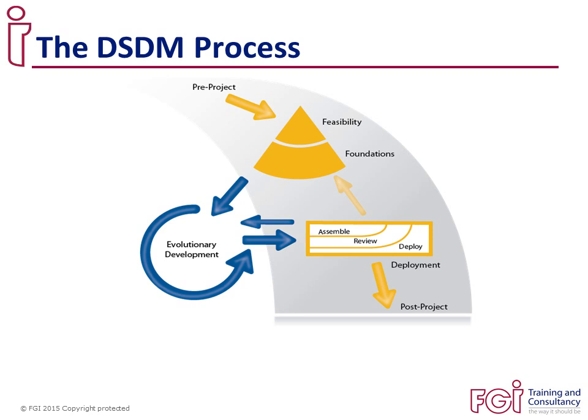The process model for DSDM looks different to the more traditional methods as well, although Agile projects still follow normal project life cycles such as pre-project, planning, delivery, and then closing. But this process model is designed more around the iterative development cycle, recognizing that in Agile we will have multiple releases, and we develop the solution as we move through the project.